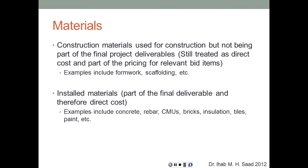Construction materials used during construction but not part of the final deliverable — formwork, scaffolding, shoring — are still treated as direct costs and priced in relevant bid items. Installed materials that are part of the final deliverable — concrete, rebar, concrete masonry units, bricks, blocks, insulation, tiles, paint — are also direct costs and become part of the permanent completed project.